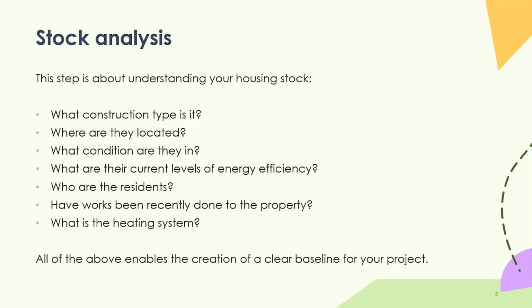Understanding what condition they're in. So this is really important to tie in with some of your existing capital works programs. If you know what condition those properties are in, and if they're going to require window and door replacements coming up, then this could be a really good opportunity to align some of those existing capital work programs where they might also need retrofit work.